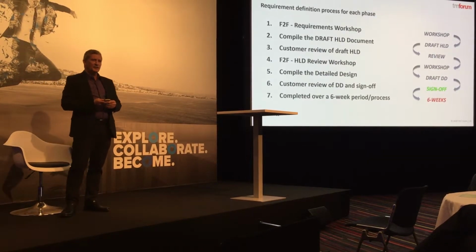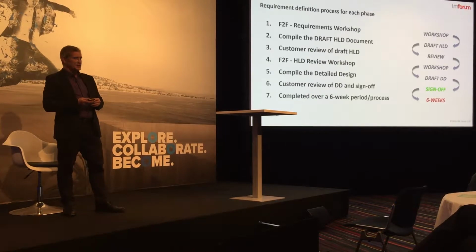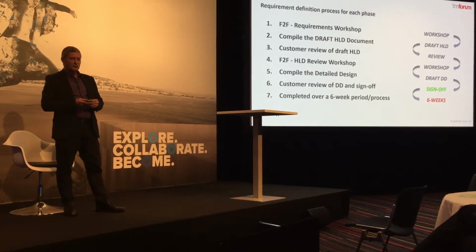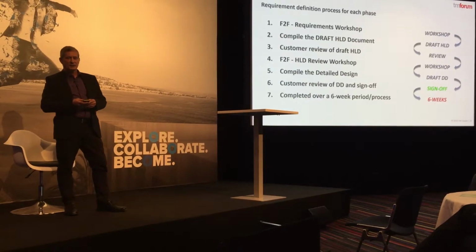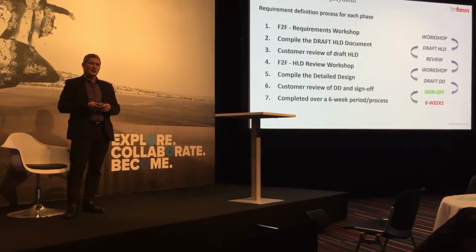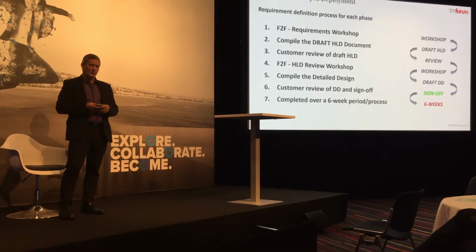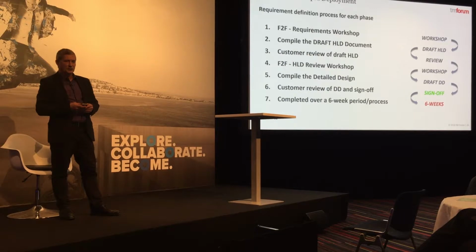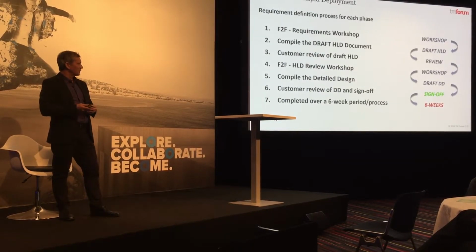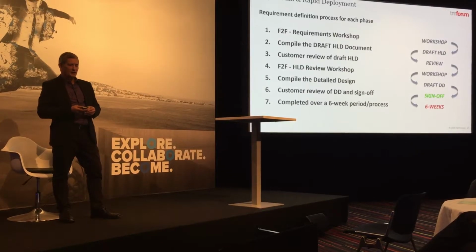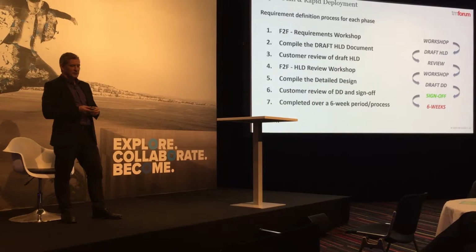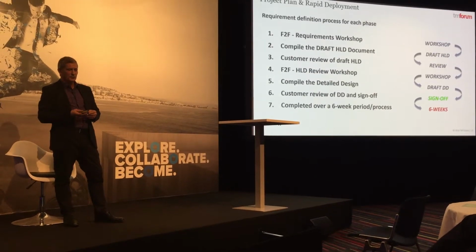For the requirements definition, we followed the same process for each phase. We would start with an on-site workshop to create the first high-level design, which Global Connect then reviewed before moving to a second workshop where we put together the detailed design. Again, Global Connect would review the final detailed design, sign it off, and this was a 6 week process we followed for each of the 4 phases.